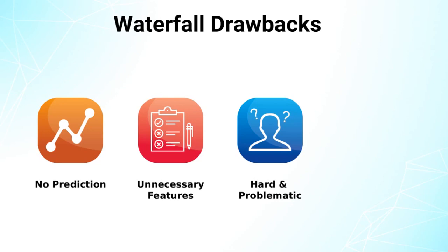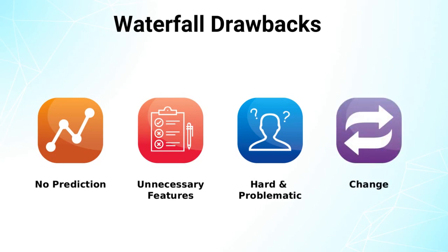And we should not forget that the market and/or your team will change while you build the product. In the Waterfall approach, you'd create a detailed plan for one big release in the future. During that time, the market may change in ways that you should be adapting to. But you don't, because you continue to follow the original plan. Also, if you lose key team members during the development of the project, it will delay the entire project because the original plan assumed that you would have the original team for the entire time.